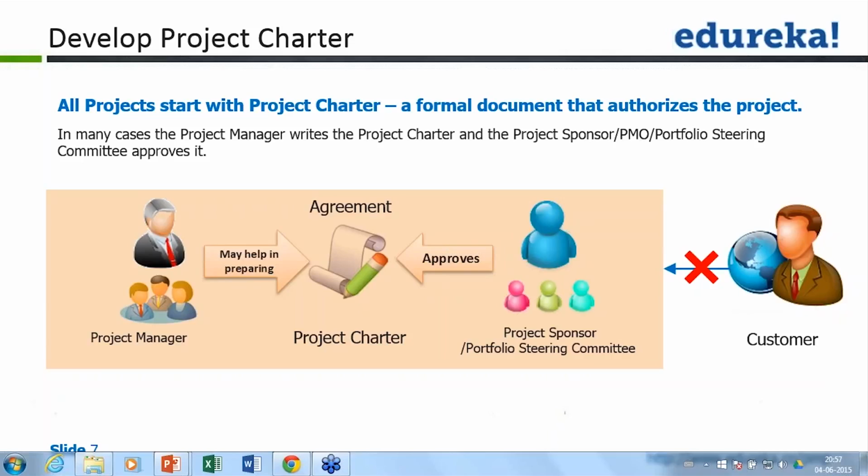So this objective will be presented to the senior management, and based on this they will sanction or allow the project manager and the team to utilize the resources. This will also be an agreement from the management side that yes, we will give you funding for this project. Of course, it is a customer who is going to pay for it, but it will be channelized through the senior management. If the project is worth $1 billion, $1 billion does not mean that the entire money will be transferred into the project manager's account or given to the project team on day one itself. No, senior management will channelize that.